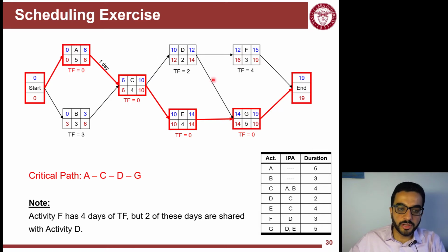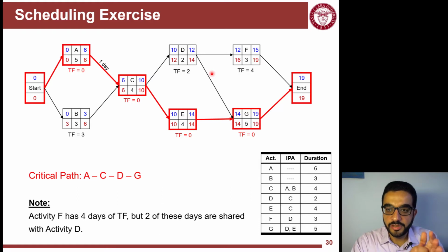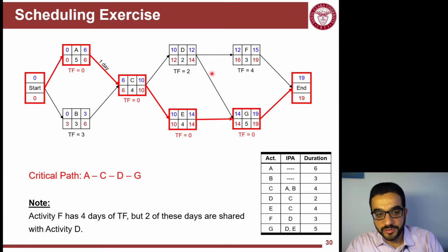This is why there are a lot of fights in handling schedules between subs, because the sub that comes first with a lot of float on their plate thinks it's all theirs. They think, I have 2 days, I will just have fun during those 2 days and deliver at the latest time needed from me. You're actually eating up the float that's given to the following sub.